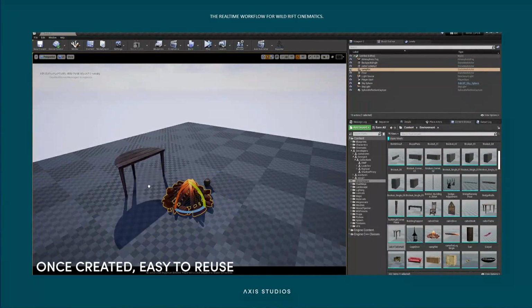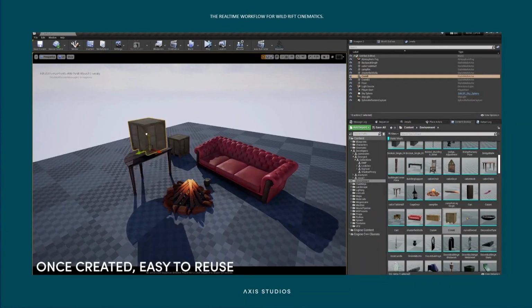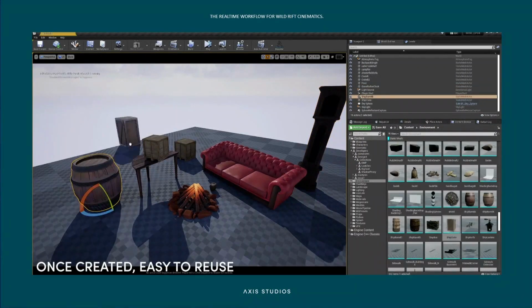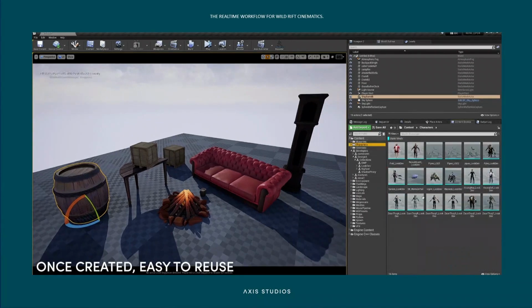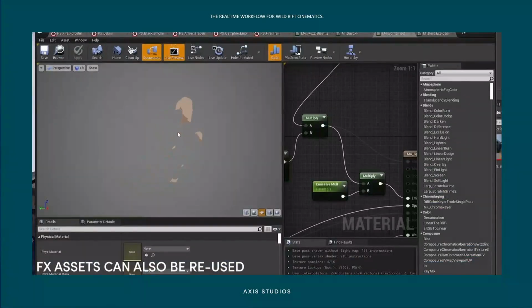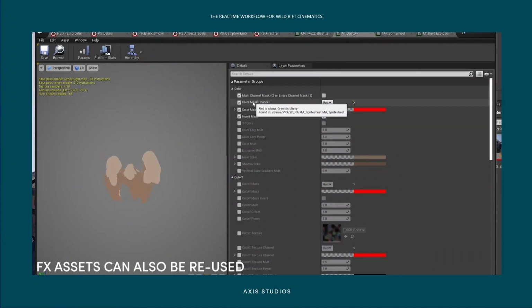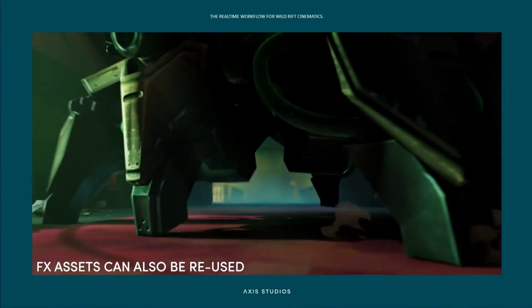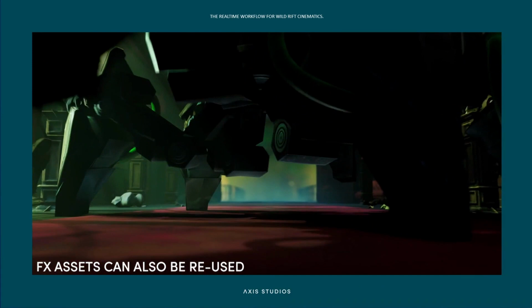The idea of expanding scope and efficiencies doesn't just apply to other projects coming into R1, this also applies within the project cumulatively. Every time we bring an asset into Unreal, every prop, every character and every effect, once you've set that up, that can then be used with essentially no extra time on a future project because you've already done the work. In the case of this effect that you can see here, we set this up for the dust kick-ups in episode 2, and then we were able to reuse these in episode 4 because we had the effect ready to go. It just needed some shot implementation. The benefit of this on an episodic project like this is that the more episodes you do, the more savings you get cumulatively, because the initial creation has been done, and then that asset is essentially living in your library.